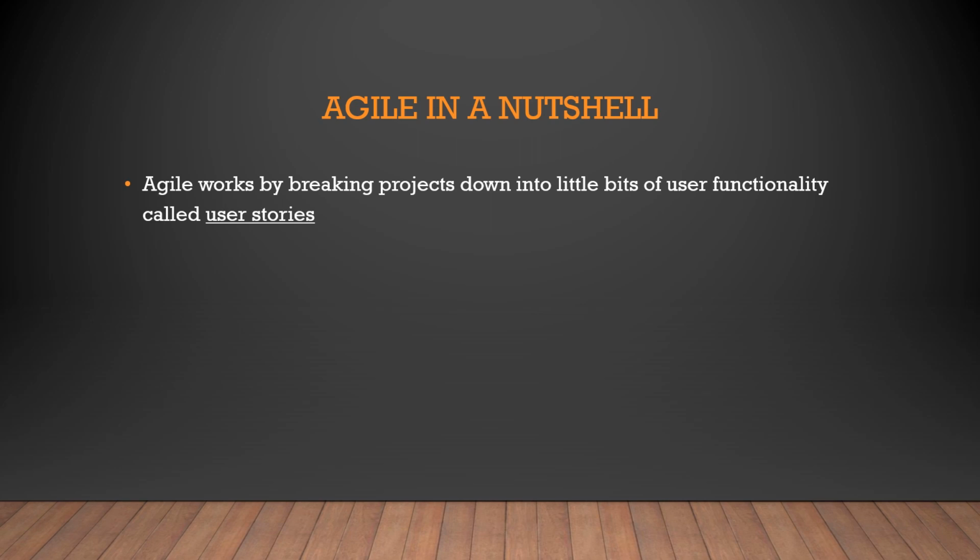So let's say there's a group of 10 requirements. You might think the first three can be delivered in the first iteration. So those three will be part of a user story, and that is something which you are going to deliver in the first iteration. So you're basically breaking down those 10 requirements into different chunks that you are going to deliver.